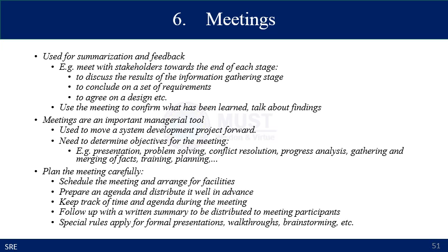So you should plan the meeting carefully, set the schedule for the meeting and arrange for the facilities, prepare an agenda and distribute it well in advance, keep track of the time and agenda during the meeting, and follow up with a written summary to be distributed to the meeting participants.